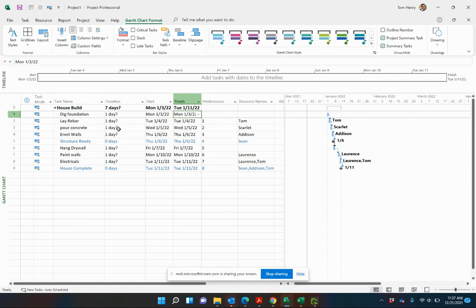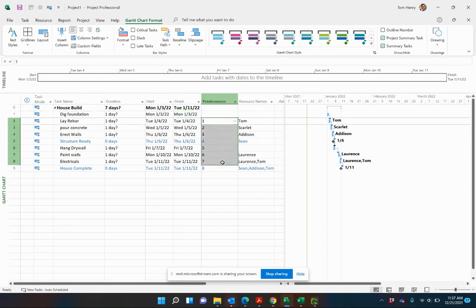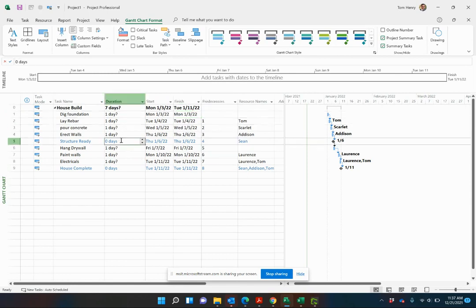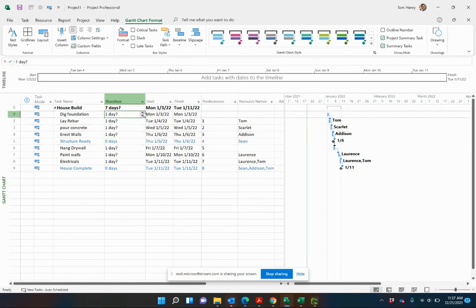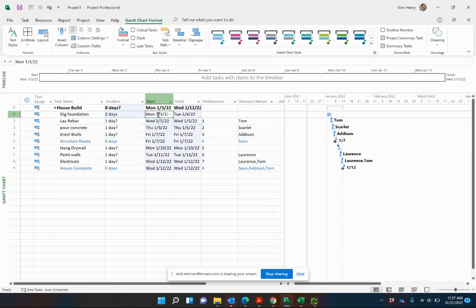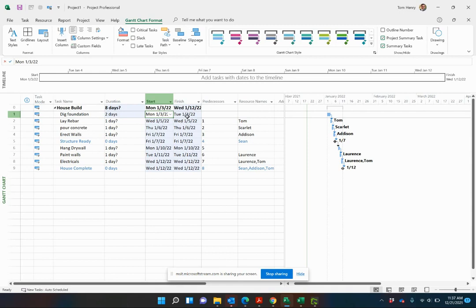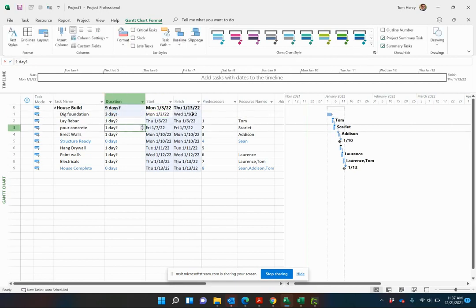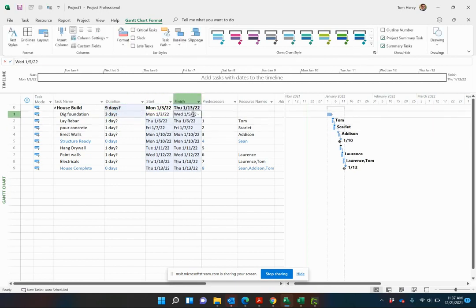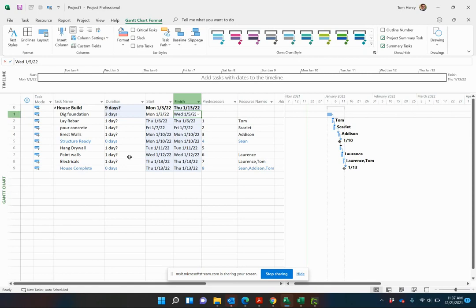You see in this project schedule, I've actually gone in and done my predecessors. For example, if I make this two days, you can see that the delta between one three and one four is now two days. It starts on Monday, finishes on Tuesday, so two days. If I make it three days, you see that goes to Wednesday and everything else is trickling on from that.